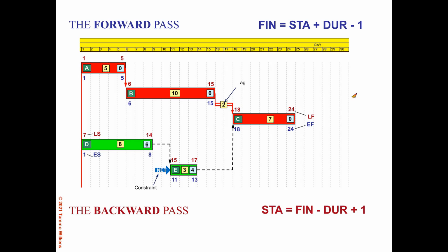Now, it turns out when you do project scheduling, you practically never have this situation where the longest path comes up with 0 float, because traditionally projects have a predefined end date. The client says, I want it by this date, or the sponsor or whoever. They set an end date. And when you assemble your network, you practically never come out with that same end date. That's just not how it works. So you have to refine your schedule until you can make it fit, but that's the subject of another matter.